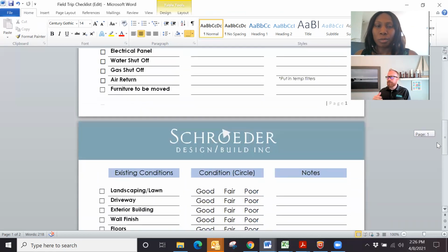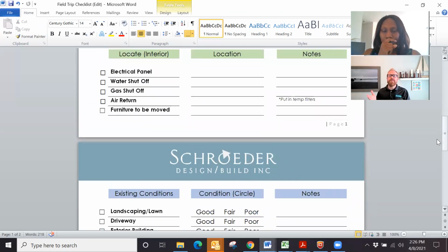Moving on the inside, in our system, generally the project manager would be on site at the trade walk, which would be a couple months prior to project start. So this would be round 2 of being on the site. Yes. In the first go round, you're more looking at the buildability of the project, assessing how we're actually going to build the project, and not as much of the overall site nitty gritty, which is what we're trying to accomplish here today. Absolutely correct.